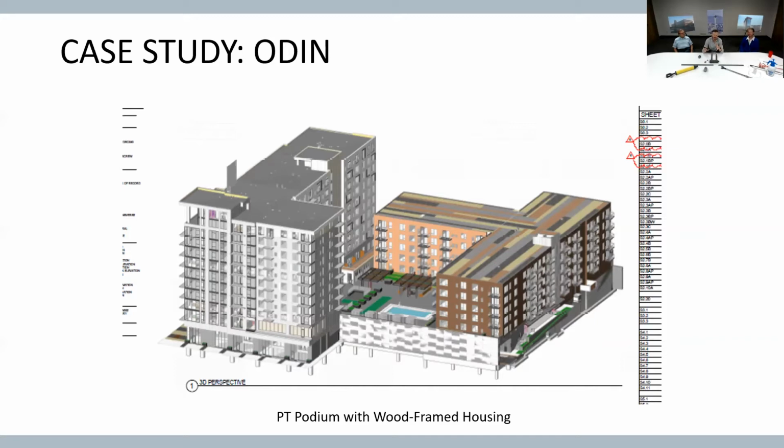We met with these guys, and 2 weeks later, we installed our couplers. And the general contractor saw the value in this and the time savings. There was a little bit of an upcharge there, but they actually said, hey, for a couple thousand dollars, this is going to save us a bunch of time. So that's how this project got going.